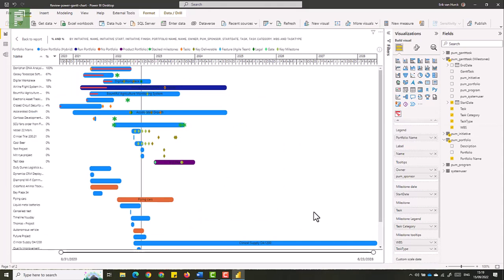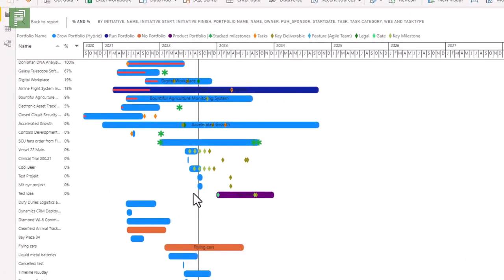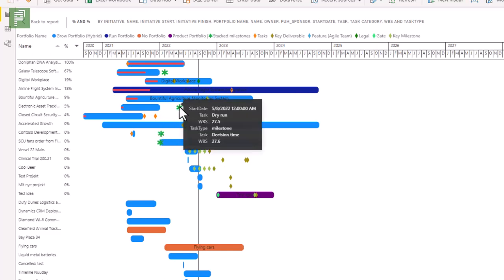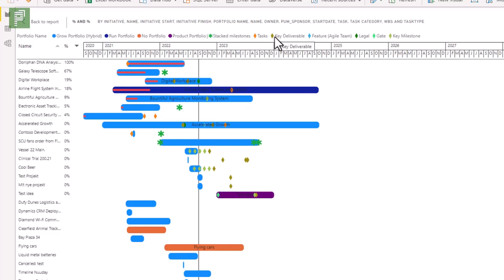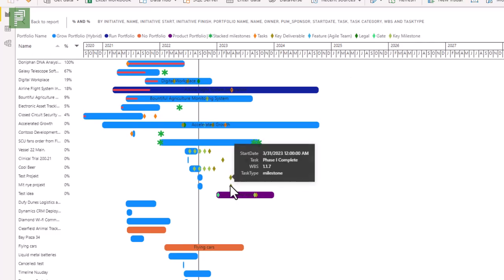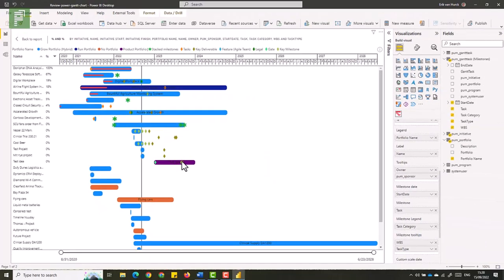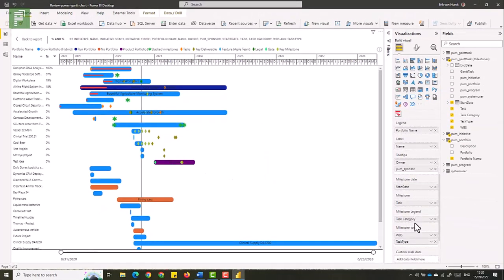So inside focus mode, I now have my colors for my bar charts. And I have my colors for my milestones. There's a specific type of milestone that is a star kind of figure. And that means that there's more than one milestone at that date. So that is called a stacked milestone in the tool. We have key deliverables, we have tasks, we have features, we have legal, we have gate, we have key milestones. All these types of milestones are in here. So that is a lovely overview.